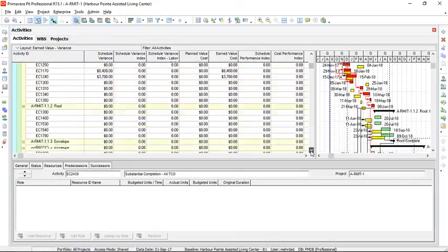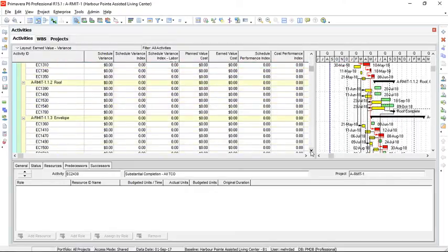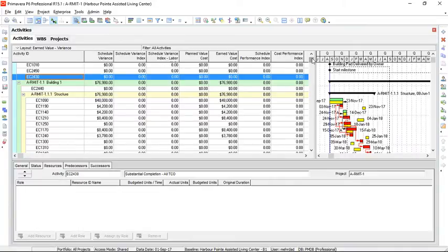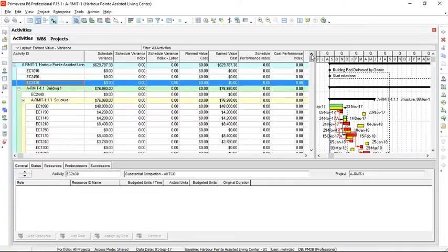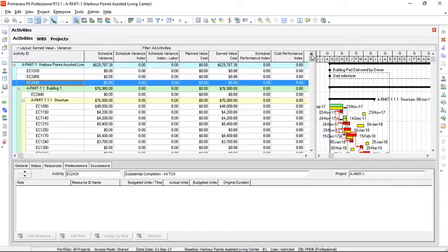In contrast with MS Project, calculations of earned value in Primavera P6 are accurate. So we don't need to manually control those values in Excel, and the precise values shown here can be used for our analysis.